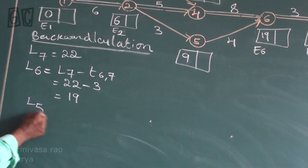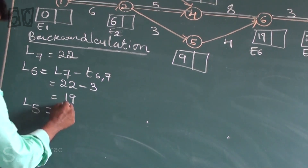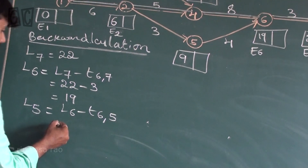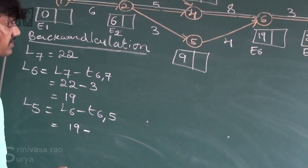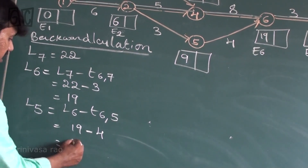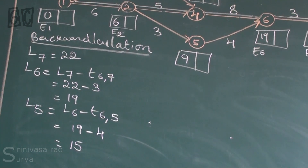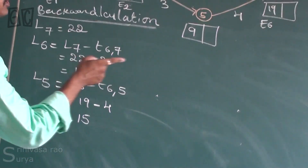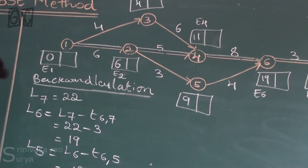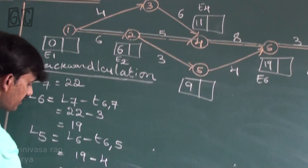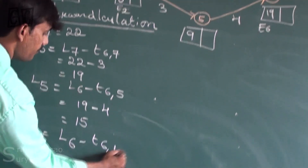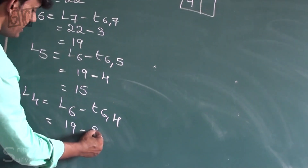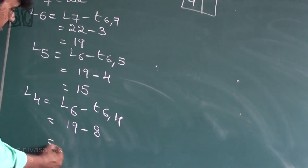Now L5: L5 is inching towards L6 minus time taken from 5 to 6, that is 19 minus 4, giving L5 equal to 15. Now L4: L4 is inching towards L6 minus time taken from 4 to 6, that is 19 minus 8, giving L4 equal to 11.